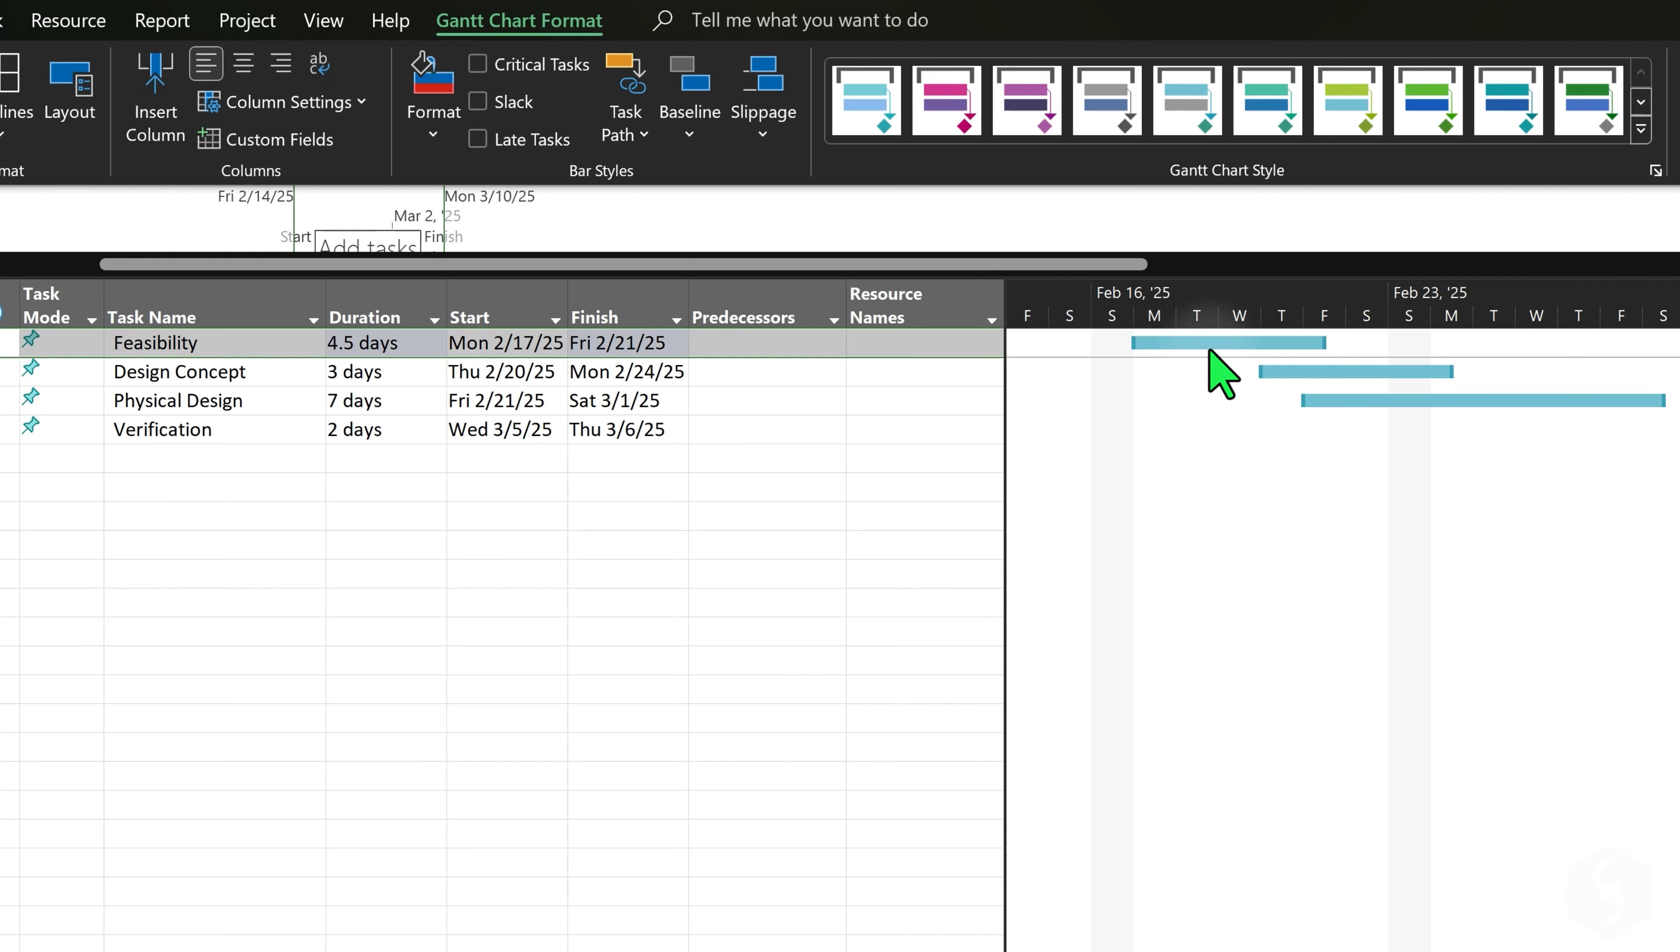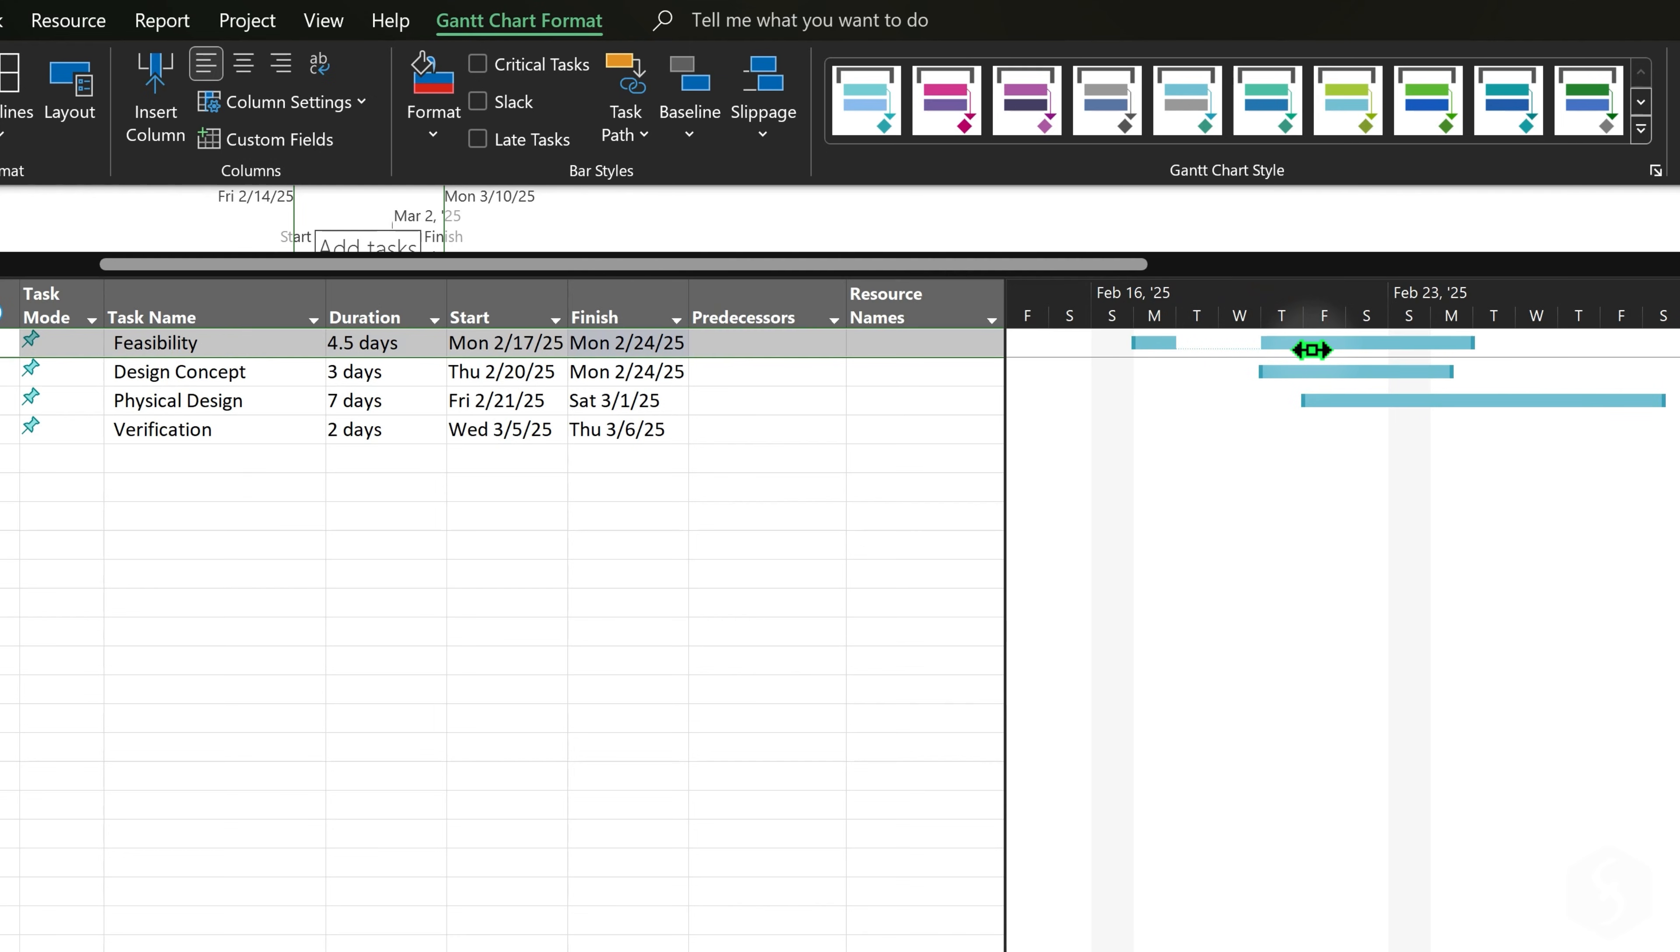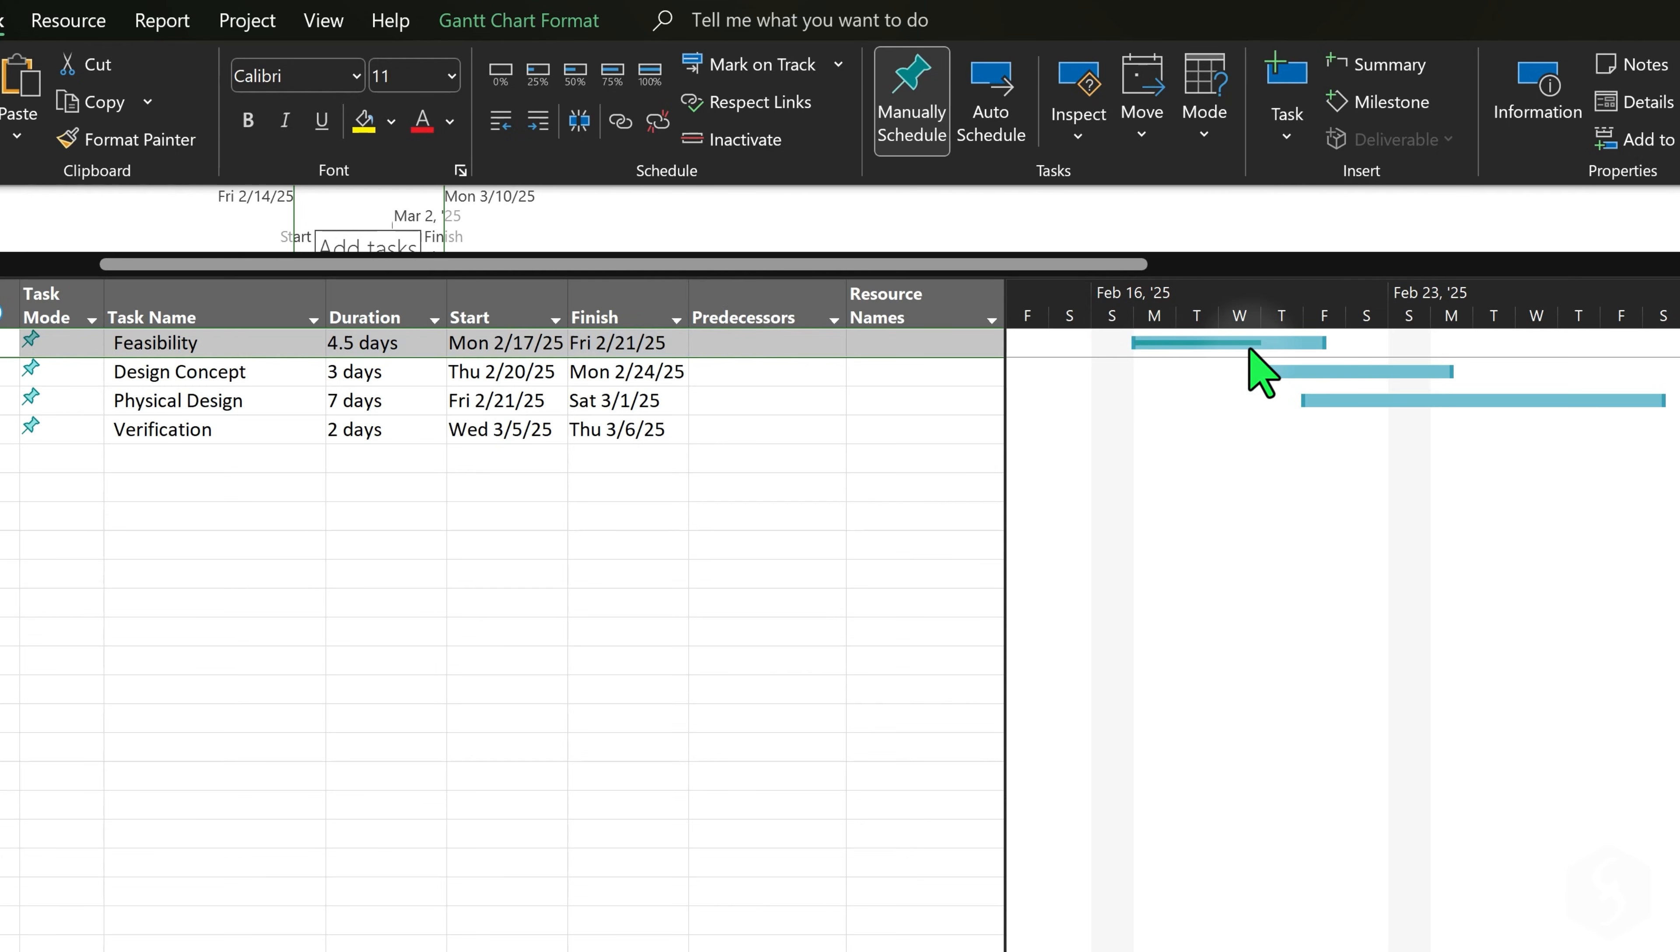To split any task, right-click on its bar and go to Split Task. This adds a one-day gap in the timeline without editing the task duration. You can also move any part and extend the gap as you need. Drag from the left edge of any taskbar to add a percentage of completion through the working days.